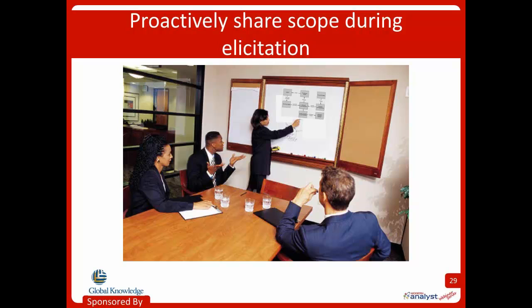Especially, if you're doing a meeting to decide what's in or out of scope, display those business objectives, put the vision up there, maybe put the scope models out. You could even just hang them around the room for the session that you're in so that people can very quickly judge for themselves whether a proposed requirement is in or out of scope. So you're trying to enable your stakeholders to help manage scope, I guess is what I'm saying.